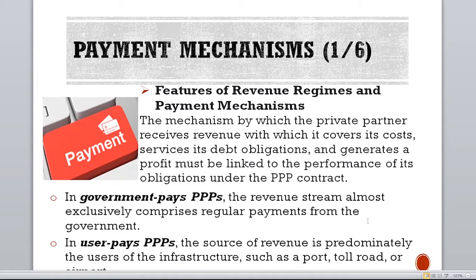We might be able to provide you with statutory support, like access to land, since the government is the owner of land. Maybe that's our own contribution to this project in kind. And then when you finish the project, based on how you forecast the expenses and the revenue stream you want to earn, we can spread it over a 40-year period. So if you spent maybe 20 billion to do this project, but from the financial models you envisage to realize 30 billion, that means the profit is 10 billion. I'm just hypothesizing. The government can negotiate that, okay, but this PPP is over a 40-year period.